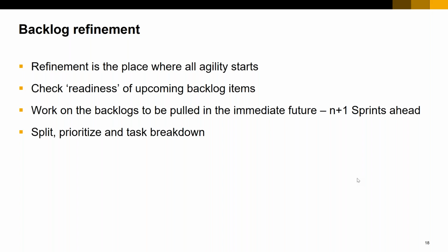So first you will enter all your backlogs, then you will prioritize all of them, and then based on the priority, you will start to assign them to your sprints. Will this be sprint 1, sprint 2, sprint n+1, n+2, n+3, etc.? And then at least for the backlogs which you are going to put into sprint n+1, there has to be detail achieved, right? So best practice is either n+1 or till n+2.